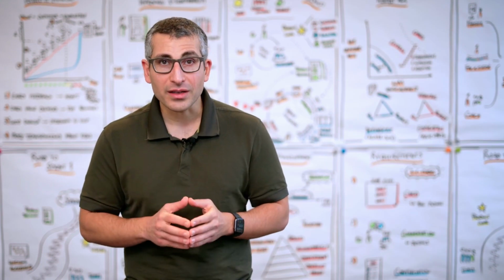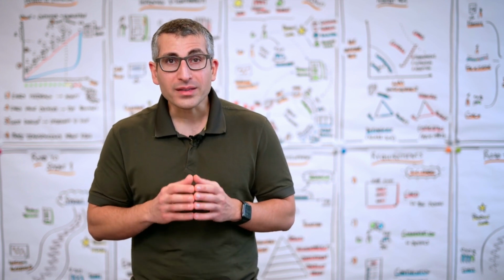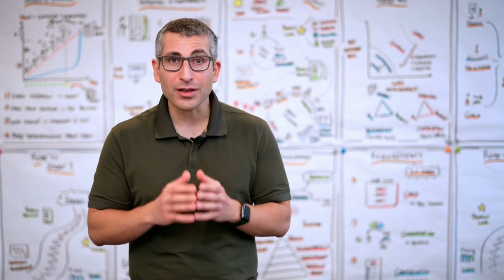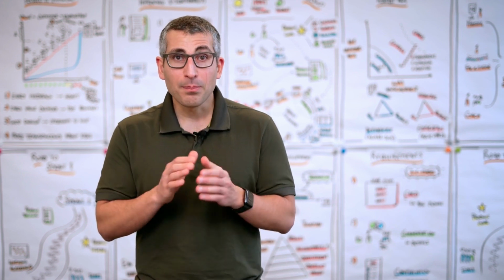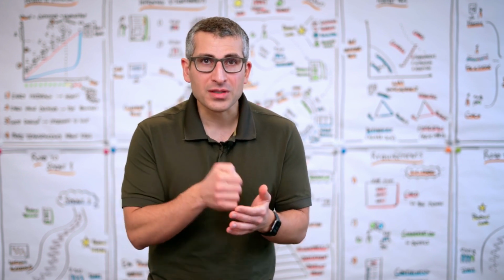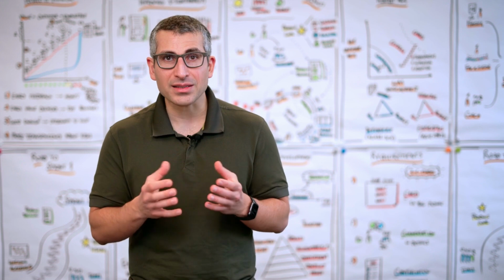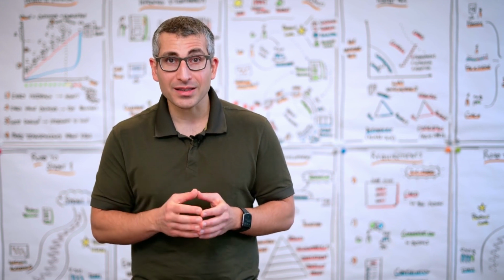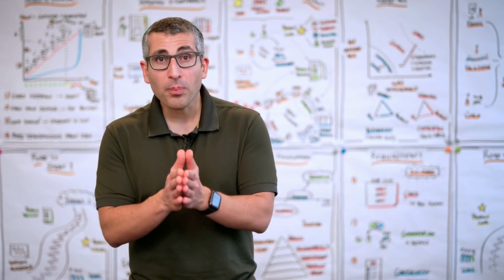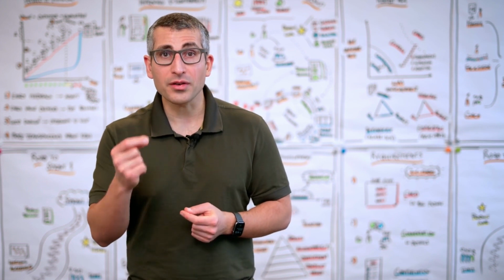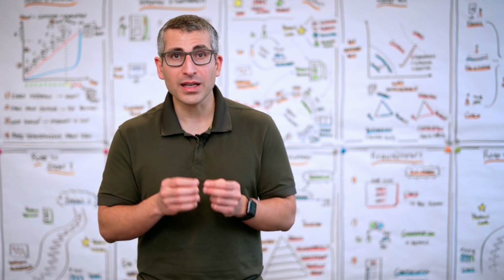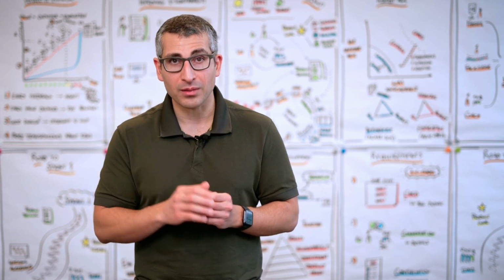And last but not least, think about what kind of adaptations, what kind of additional features can you implement in your Kanban board. Be it the fast lane for specific things that your stakeholders are asking about, or emergency items that you have to deliver, or a parking lot where you highlight the dependencies that you have towards other teams and why you can't move a certain item to done.